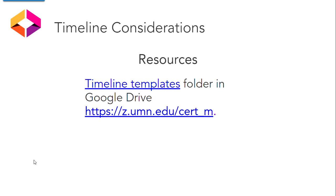We've included a list of possible places to get items for your timeline. The folder includes examples of various approaches to the timeline. It also includes everything from Gantt charts and techie tools to basic examples. Choose the tools that work best for you. You might also consider creating two versions of the timeline — one for your administrator and one for you. Your timeline might be more detailed than the one you share with your administrator. The one you send up the ladder might focus on just the major dates and accomplishments or actions.